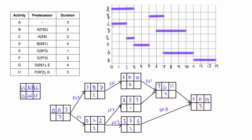Activity C goes from zero to two - zero to two, that looks okay. Activity E goes from two to three - that checks out. Activity F goes from three to five - same thing on the Gantt. G goes from seven to eleven - same on the PDM network diagram - and H goes from eleven to fourteen. This highlights the fact that you can do this visually using a Gantt chart, or get the same results doing your forward pass on the PDM network diagram, and it's a good way to cross-check between the two.